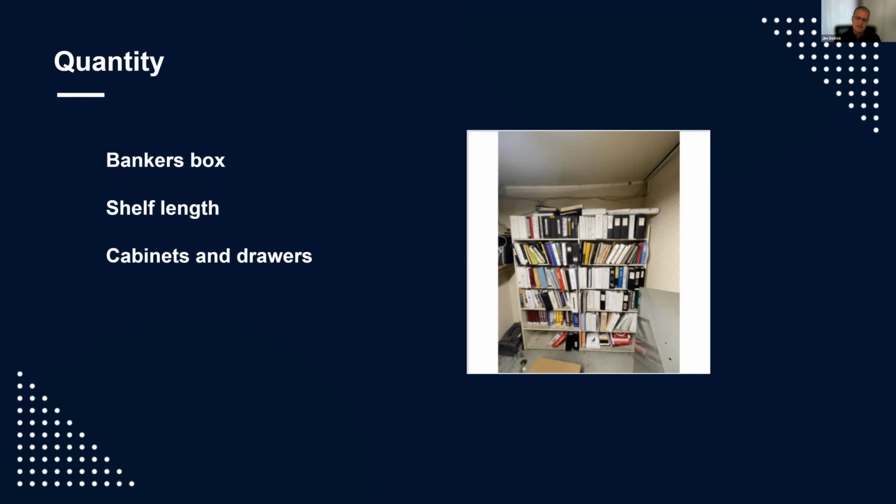So this is where the estimating gets to be a little bit more challenging, because we have to figure out how full those 4-inch binders are. Do they contain 2 inches of documents or 4 inches worth, and so on and so forth. So this is, I think, a good way of illustrating that sometimes you get a mishmash of material types within one collection of records.